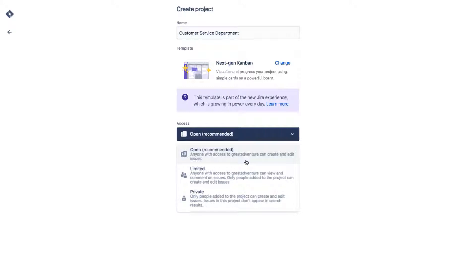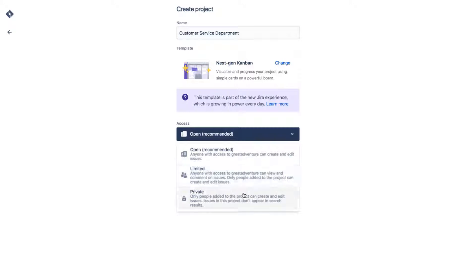Open means anyone with access to the Jira Cloud instance can create and edit issues in the project. Limited means that anyone with access to the Jira Cloud instance can view or comment in issues, but you have to add people to the project for them to be able to create and edit issues.